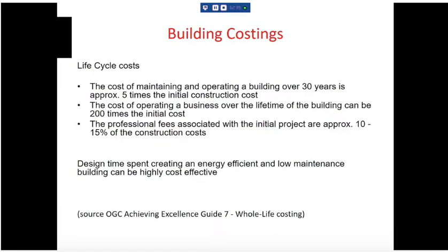So it's important that Alex has got a figure in his mind for what the architecture school extension is going to cost. But actually, if he stood back and said, yeah, but what's it going to cost over 30 years? Because I've just employed this really clever architect who's using these products that have really long life and it hardly needs any heating. Well, in fact, it's carbon negative, so it's providing energy back to the grid. Well, actually, paying another £1 million isn't such a daft idea because I'm going to save 5 million over the next 30 years. So this is why it's important.